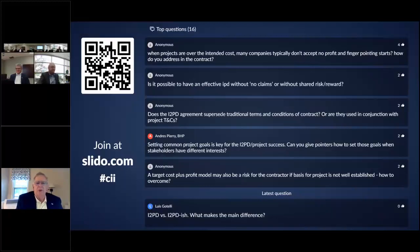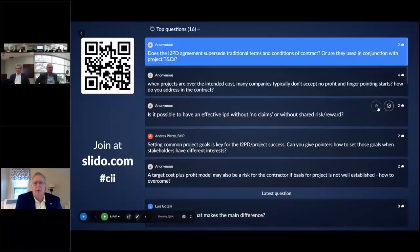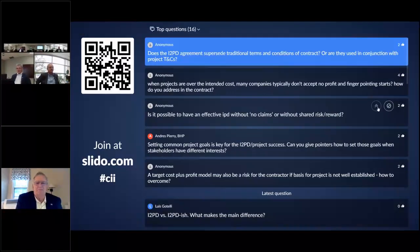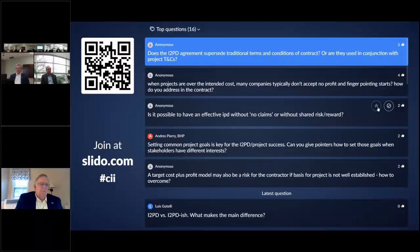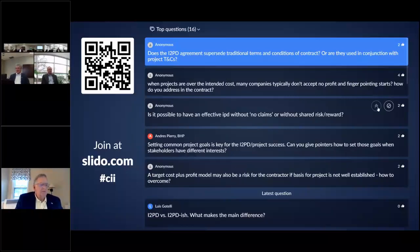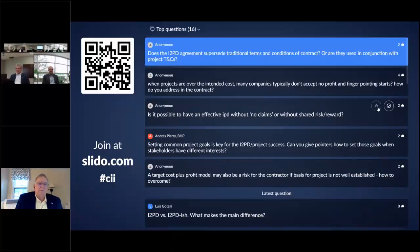Does the I2PD contract supersede traditional methods and conditions or is it used in conjunction? In some cases it supersedes them — liability clauses, claims, and warranty clauses are radically different. Other clauses with respect to construction methods, engineering methods, and roles and responsibilities are very similar. At the end of the day you're still planning and executing an industrial project, so you've got to have a lot of standard clauses that organize you and set up the division of responsibilities for the parties to work together. Think of those nine principles and you'll probably get an idea of which clauses have to change.